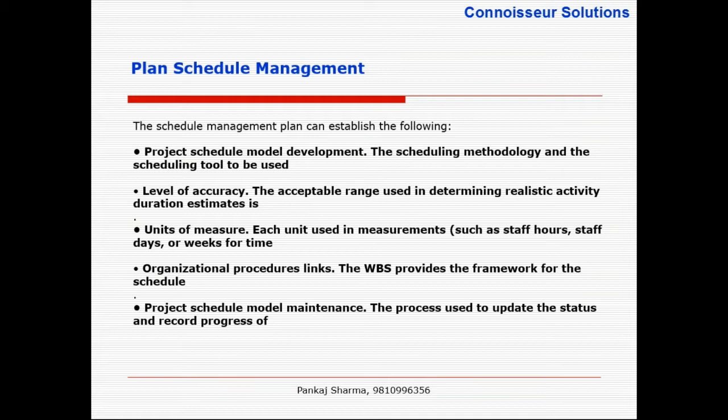See, the reason I'm emphasizing this is sometimes you get a direct question in the PMP exam: what is order of magnitude? Order of magnitude estimates can vary from minus 25% to plus 75%. When I say this range, people get surprised that PMI allows such a big range. But this is a range. PMI is not saying your acceptable range should lie in the extreme. PMI says in the worst case scenario, order of magnitude can be in the range of minus 25% to plus 75%. But in a realistic environment, nobody will allow you to have order of magnitude plus 75%.